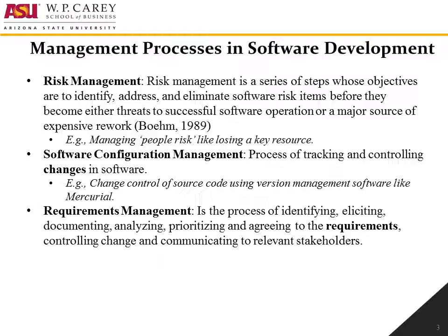Then we can talk about requirements management, which is basically the process of identifying, eliciting, documenting, analyzing, prioritizing, and agreeing to the requirements, controlling change, and communicating to the relevant stakeholders. The basic purpose of requirements management is to ensure that the organization documents, verifies, and meets the needs and expectations of its customers, internal or external stakeholders.